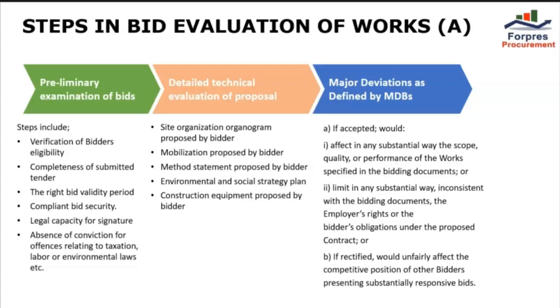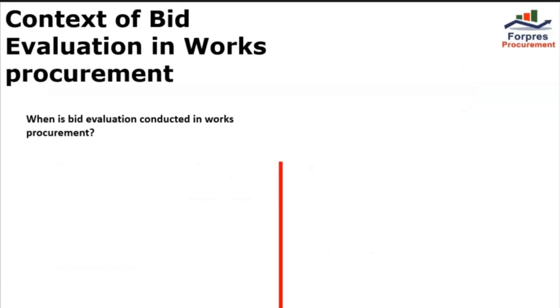Other minor deviations in any bid which are considered by the Bid Evaluation Committee to be acceptable and would not justify rejection of the bid are noted during the technical evaluation, and the cost of remedying such minor deviations is worked out into a monetary sum to be added to the respective bid price during financial evaluation, based on comparison of the prices of such deviations in other non-deviating bids, and using the bid evaluation's own estimate for eliminating such minor deviations.